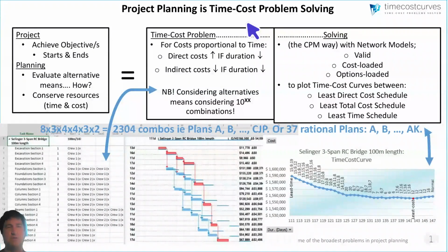When you break down your project, which is an essential step, into certain activities and arrange them, each of these activities don't just have durations, they also have costs. And taking one step back, you need to always keep in mind that how you are achieving the completion of an activity, how you're carrying it out, is the essential determinant for how long it should take and how much it should cost. So for each activity in the network, it has a direct cost and a direct duration.